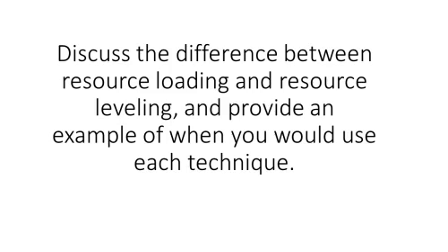Let's look at an alternative definition. Resource leveling applies the resource constraint to the project and may result in a change of project direction. Resource leveling is primarily driven by resource constraints, like you do not have more than 45 hours of a given resource for a week. The allocation limits identified in resource leveling must be applied.